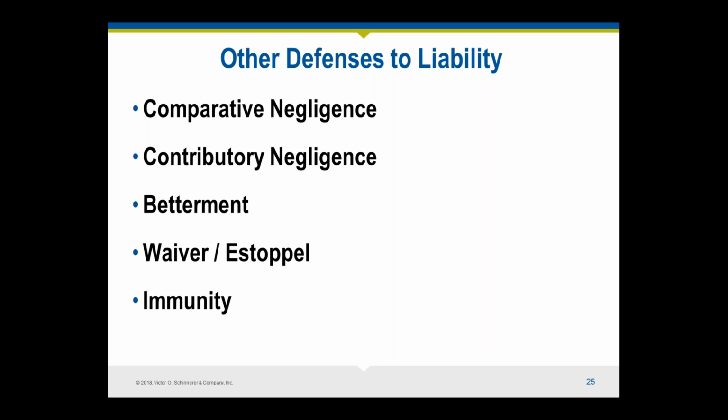So if you were negligent and you didn't design them, would it be right for you to be responsible for the cost of all those doors? It wouldn't be, because had you designed it in a non-negligent manner in the first place, the client still would have paid for the doors. So basically, betterment says that the client shouldn't be better off. They're still going to pay for what they would have, but betterment is always open to negotiation. And if there's an extra cost now because the doors weren't ordered early on when everything else was ordered, you're going to be responsible for that difference in the cost.